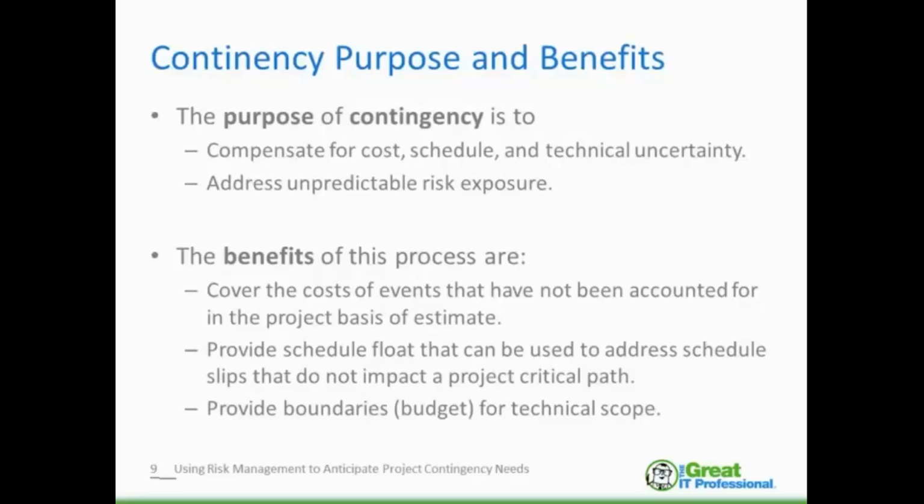So there's another category of budget contingency called reserve. And reserve is an amount of funding that is typically held outside of the project and is used to address risks that are realized beyond project control or forethought. And funding from an organization, for example, may be added to a project to manage risks that are realized through no fault of the project, say for like a COVID situation or another pandemic.